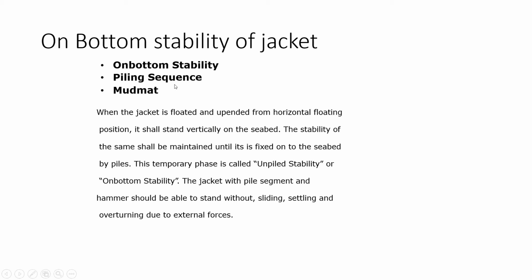And then what we are going to conclude is the piling sequence. Suppose there are four legs and the grid is A1, A2, B1, B2. Which pile do I have to put where, whether A1 or A2, B1, B2? So the first is the piling sequence, and P1, P2 is nothing but pile 1, pile 2. Whether I have to put pile 1 first or pile 2 second, or which leg, all those things will be concluded in the piling sequence in the on bottom analysis.